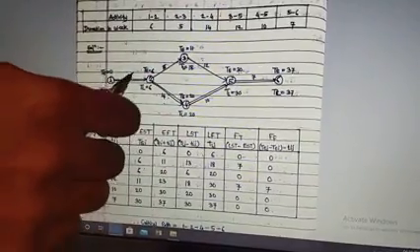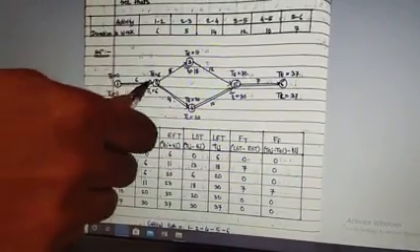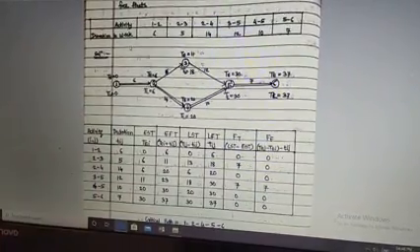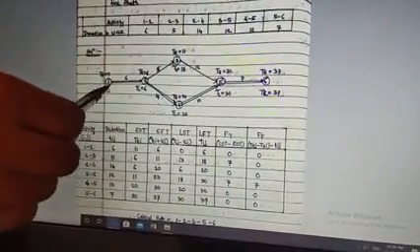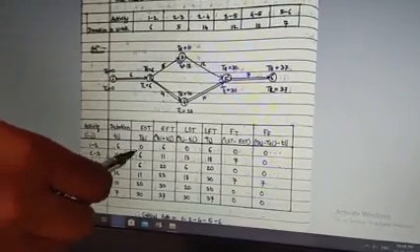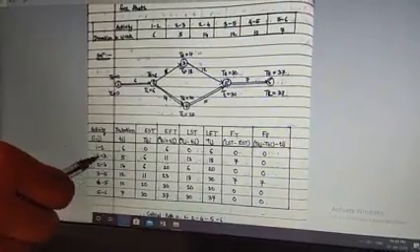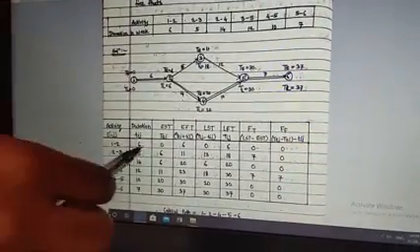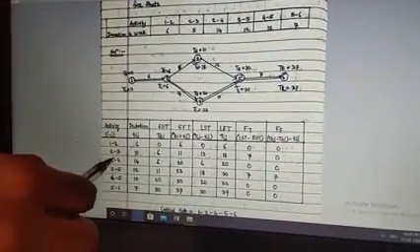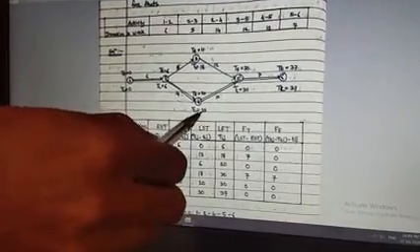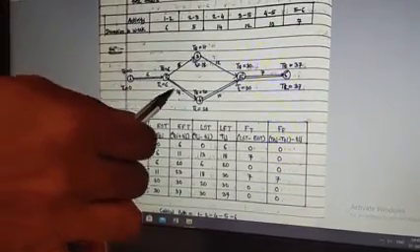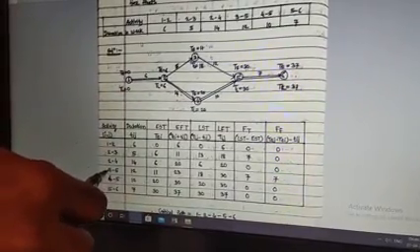Before I go for this activity, I am going to spend 6 weeks on my first activity. Because of this, for the second activity, the duration of the first activity becomes the start time of the second activity. In the same manner, if I consider the third activity, which is 2 to 4, again the answer is the same, that is 6. Correct? Then if you consider the fourth activity 3 to 5, I have written it as 11.